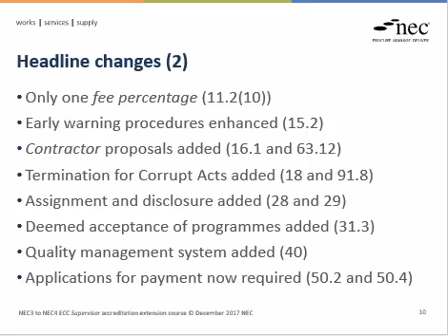The early warning procedures, the old risk register and risk reduction procedures, have been enhanced in clause 15. Contractors' proposals have been added in clause 16. There's a new termination for corrupt acts and a new definition of what a corrupt act is in clause 18. Assignment and disclosure clauses have been added.